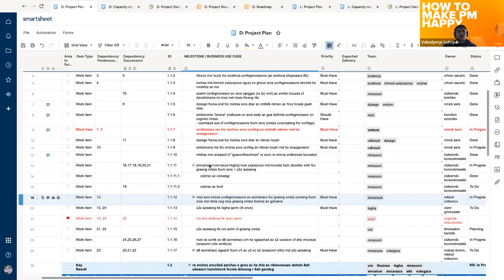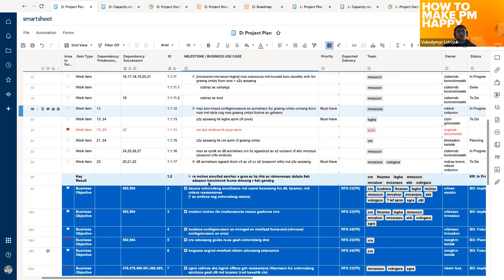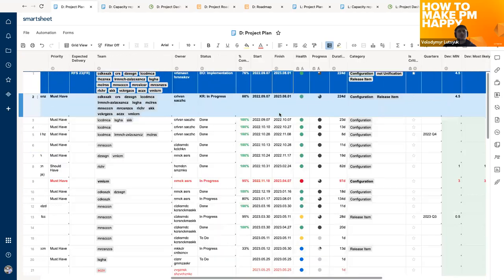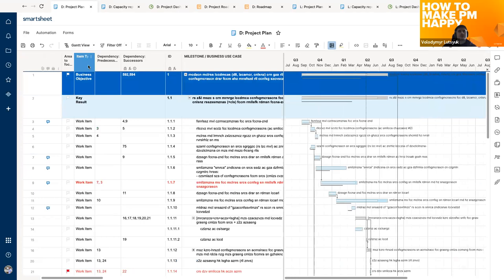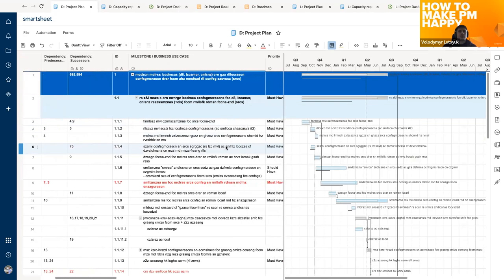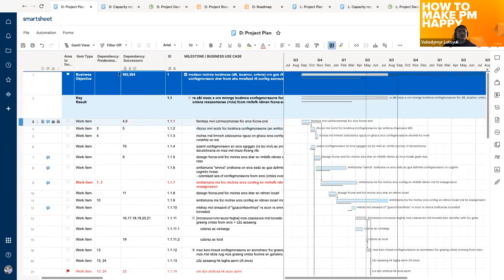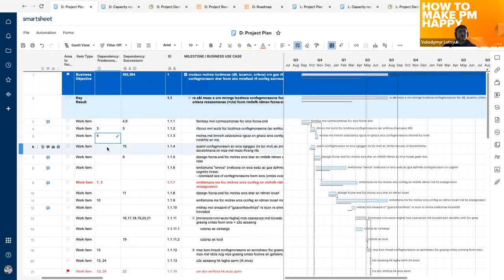Blue and light-blue rows are filled by product people; white work items are filled by technical people. We have different views: the grid view with only rows and columns, and the Gantt view which automatically creates a Gantt chart for your working items and displays the dependencies. For dependencies, we have two columns where you can specify which row depends on which — you just put the row number you depend on in the dependency column, and that's it.